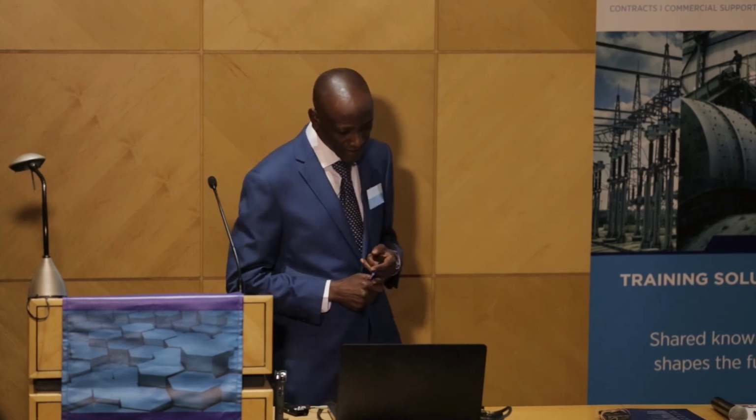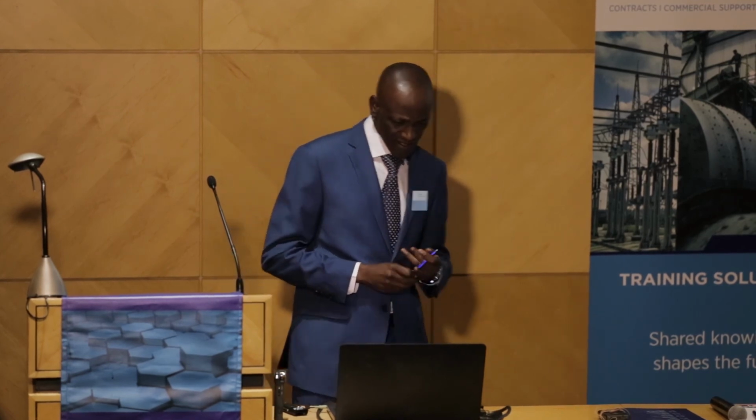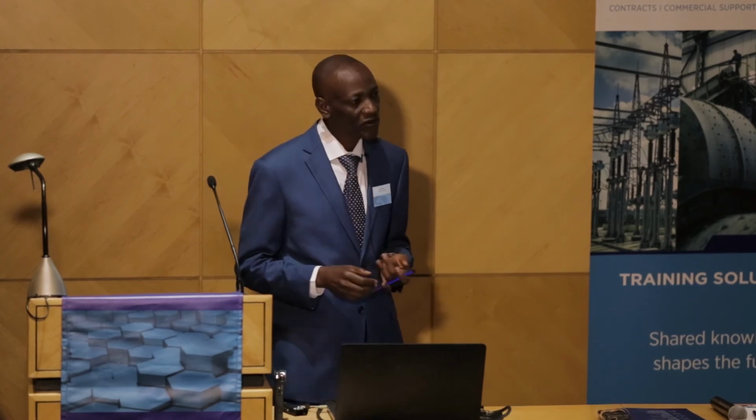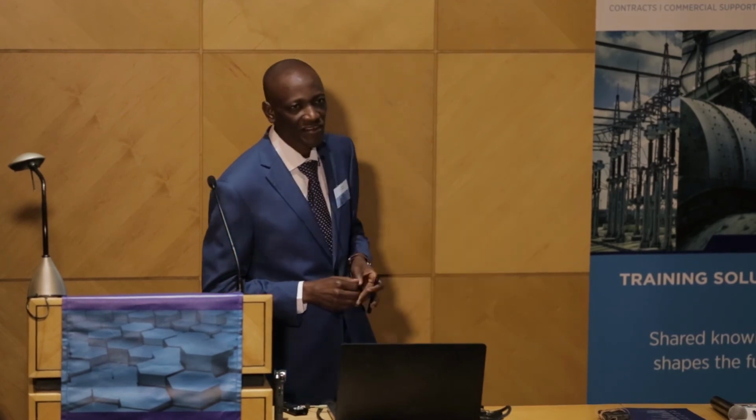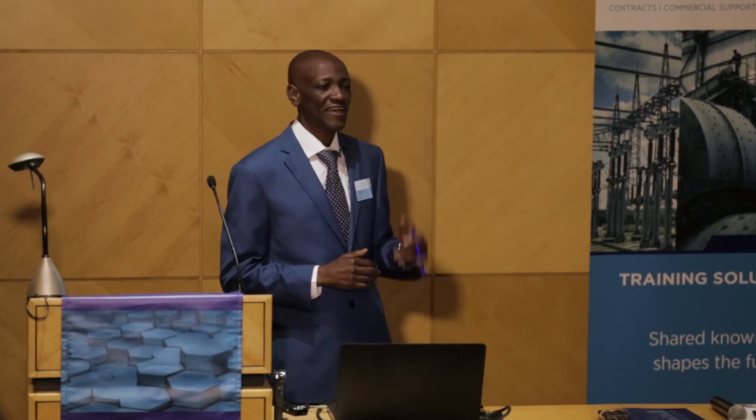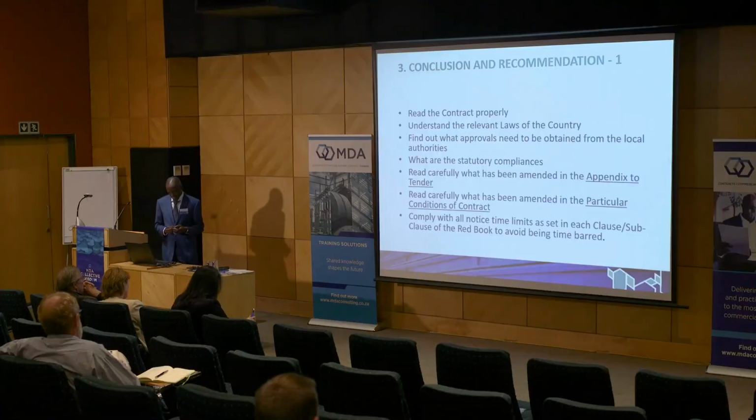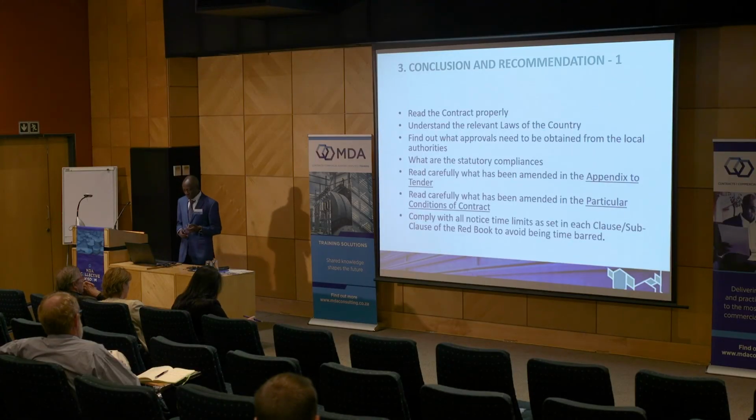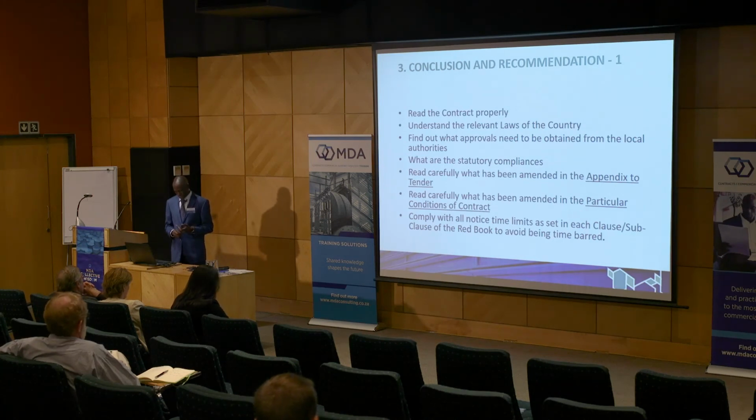Right at the beginning, he should find out which approvals need to be obtained from the local authorities. As I discussed, it takes a long period to get these approvals. There are also some statutory compliances he needs to know which he is supposed to comply with.